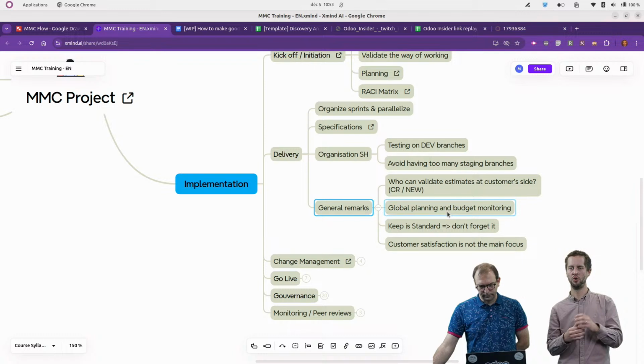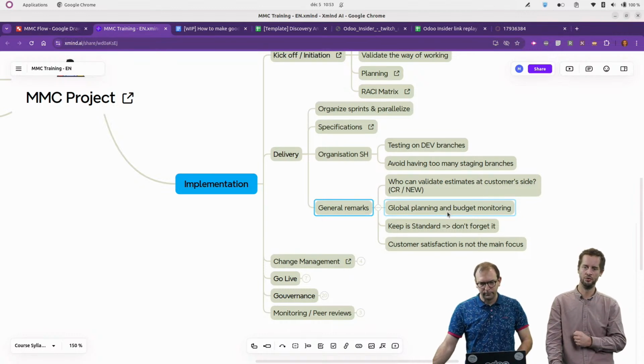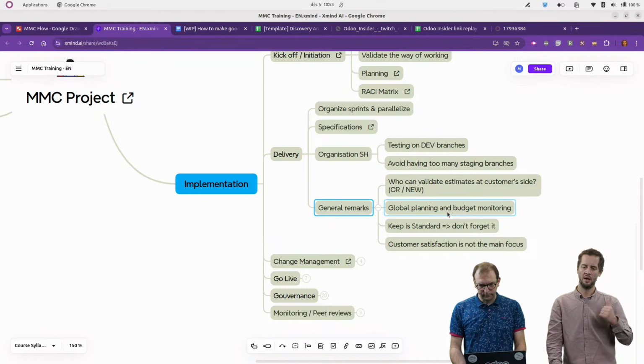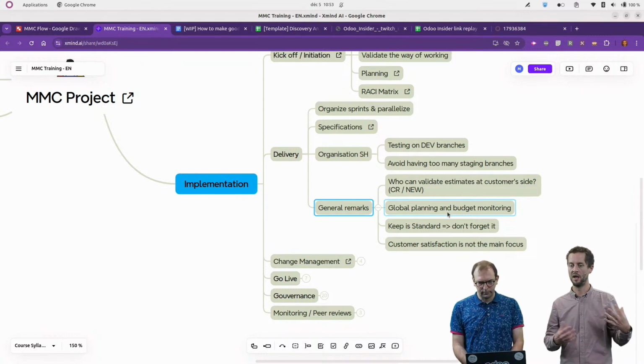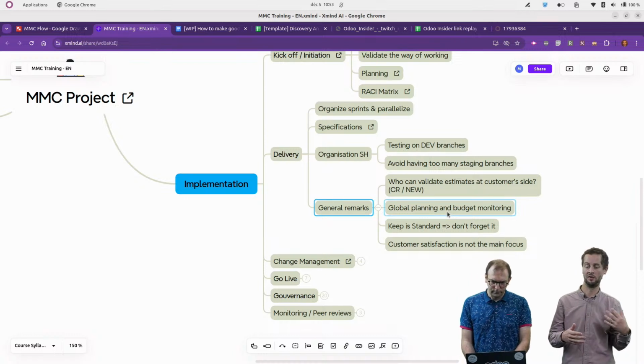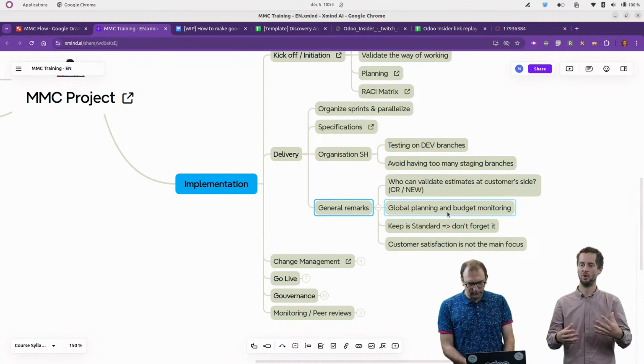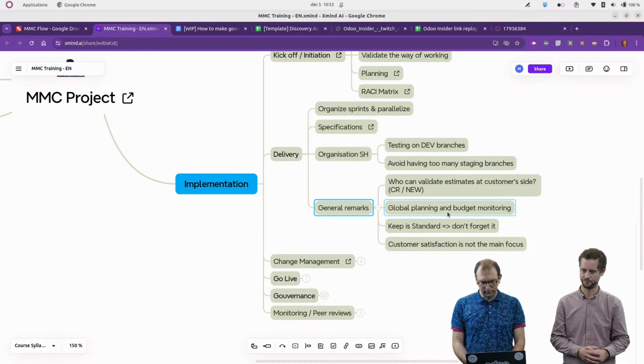So it's really important to find who is fully responsible for the budget, and who is paying the invoice at the end, to make sure he is aware that we receive new requests and that the budget will increase. It's not to protect ourselves, it's just to notify people that doing something new will have an impact on the planning and on the budget. If we have to do it, everyone must be informed, and it has to be validated by someone and for some good reason.